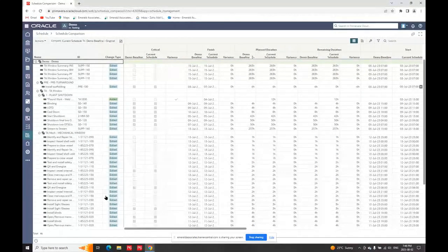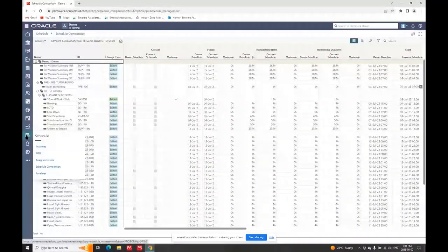So depending on how many different comparison files you have available, and of course it's comparing the same file, it runs along the same lines as the P6 client. If you're comparing two files, it's going back to the activity ID. That's what it's using to decide which two pieces to compare. And of course, we've got baselines as well. You saw the baselines in the other module.